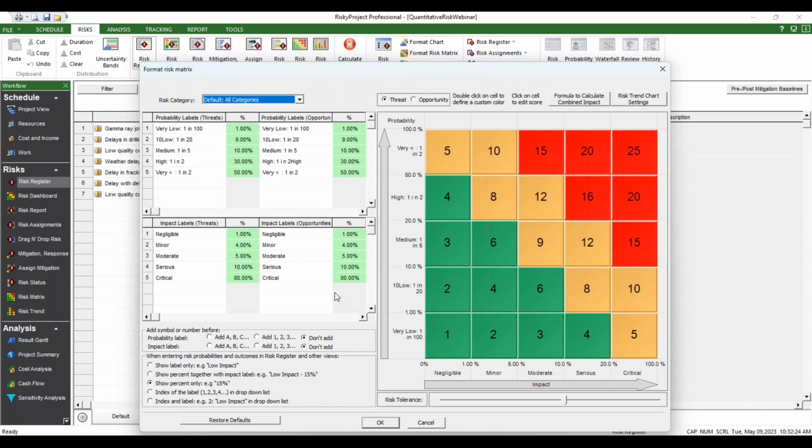has issues. It's a very nice, quick tool to be able to say, well, here's this risk, we think it's up here, as long as it's set up correctly. And typically, we do see people using it, and it's not set up that way. They want to look at it, but they haven't gone through the process of modifying the ranges so that when they're done their analysis, they can push out the risk matrix and it actually reflects how they're assessing the risks.